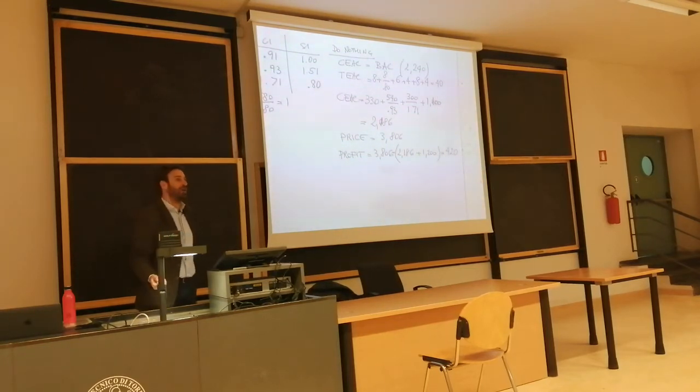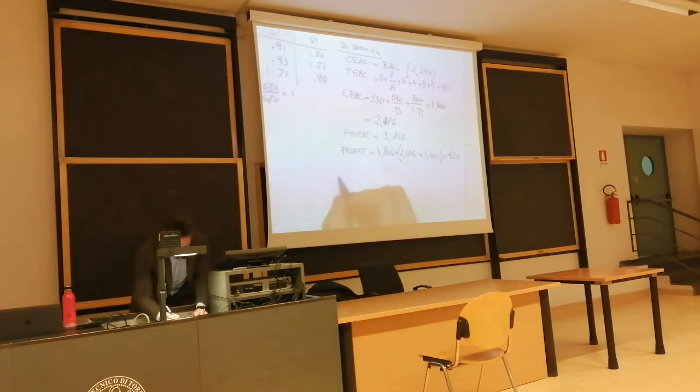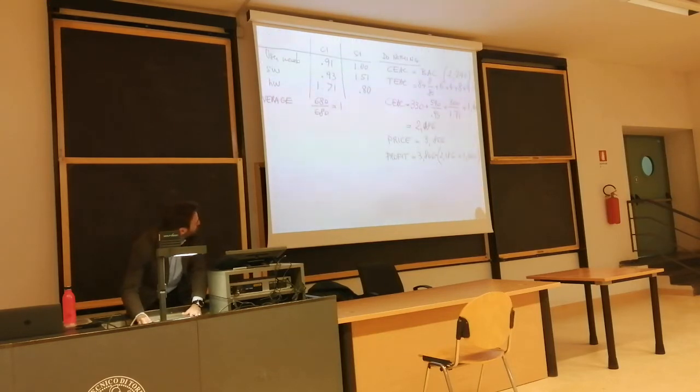So let's save 100. Let's have a longer project. We'd save 50,000 a week for crashing F, but we incur 30,000 more per week of overhead. So in total, we could save 40,000. All right? Slow down, that's the solution. The opposite solution is slow down. Plus 2 weeks, longer project.